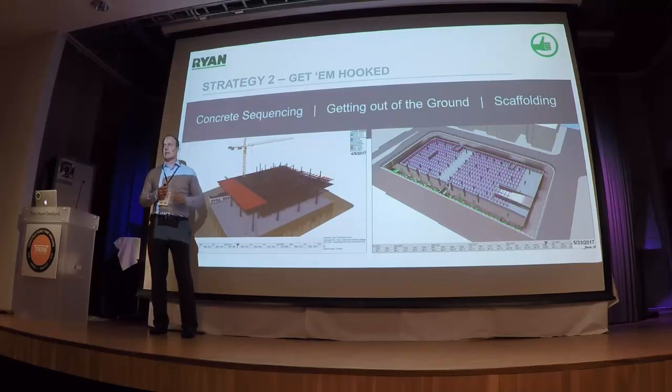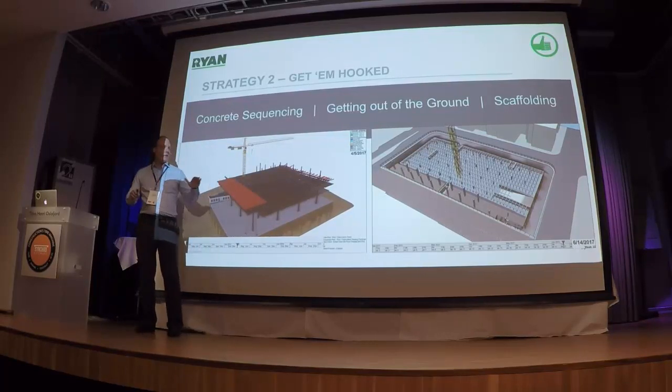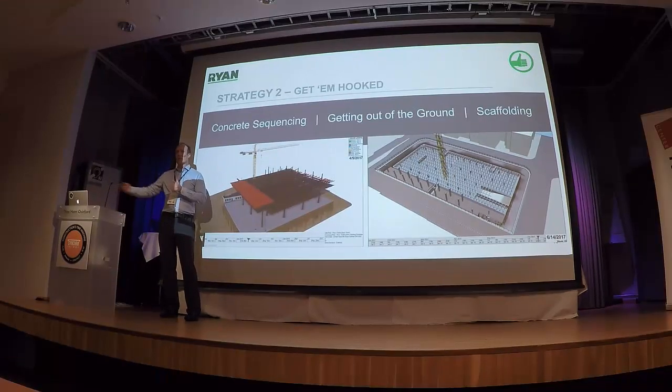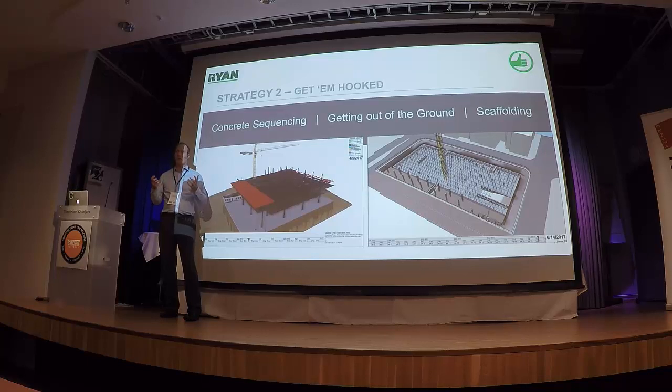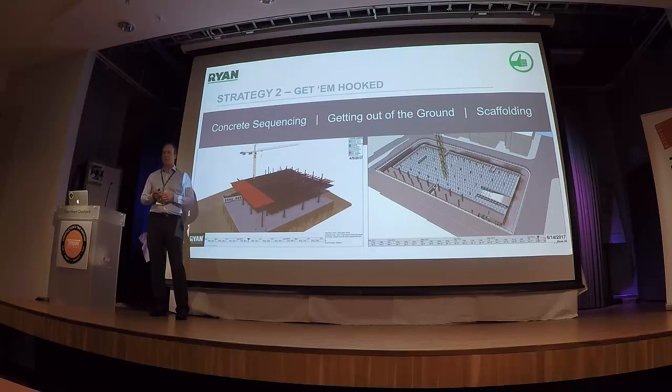And what's key for these mini studies is they gotta be detailed. We model everything. We model the shoring exactly like the shop drawings show. We model the foundations, the steel, the reinforcing, whatever the heck might impact. We always model the property line to see if shoring is encroaching outside of the bounds. Maybe there's some key utilities out in the frontages. So model everything, because you want to make those mini studies as real to the end construction condition as you can.